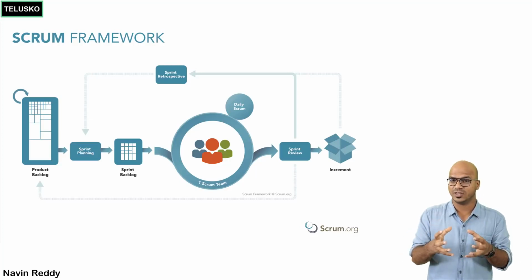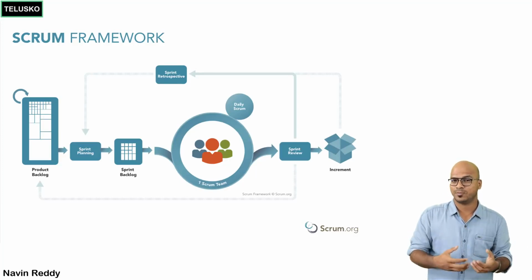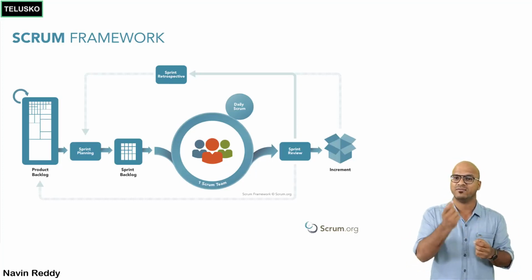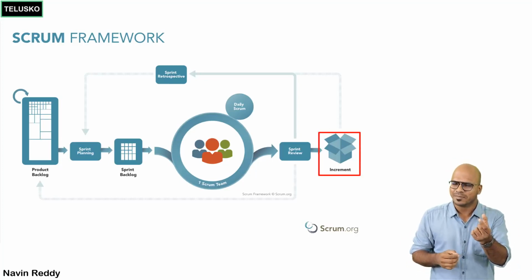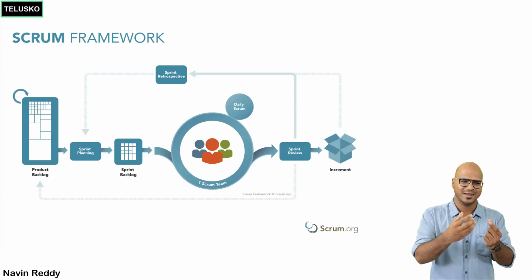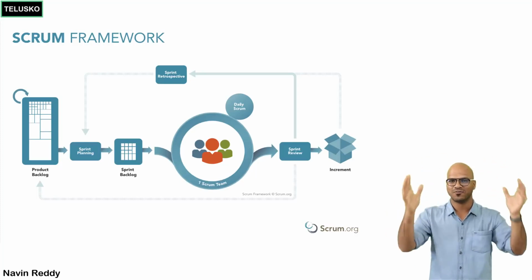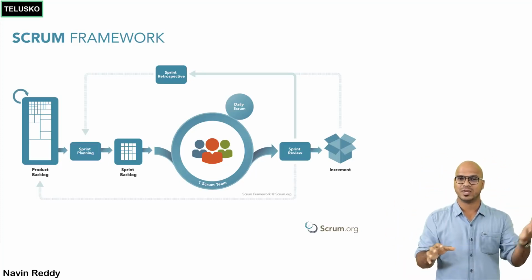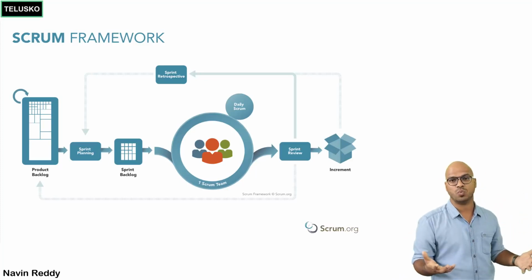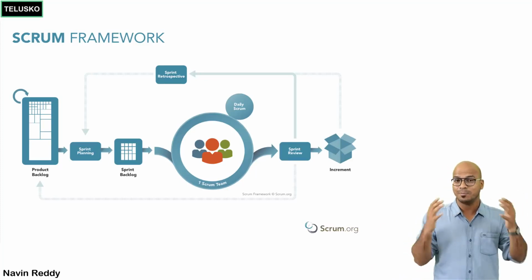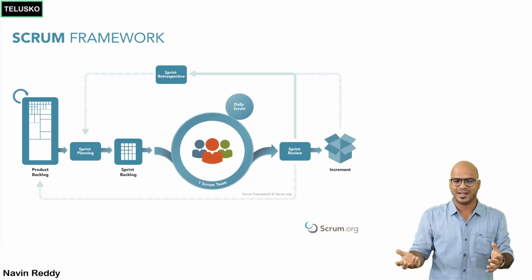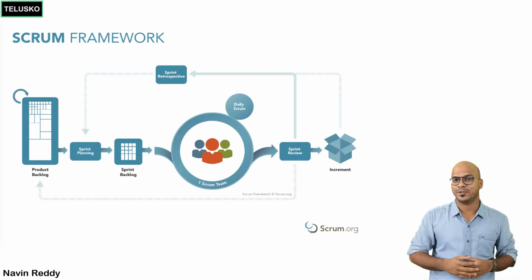So let's say you have a team with you. Now this team will work on the product. And after the first sprint, let's say after 2 weeks, you will give the first increment. So what is an increment? You can imagine this as a potentially shippable product, okay? So let's say if you are building Facebook, you got a first page where you can post feeds or you can see feeds. That's your first increment. Now this is not the actual Facebook which you wanted, but you got something, right? You can deploy the product in the first 2 weeks, right? So that's the increment.